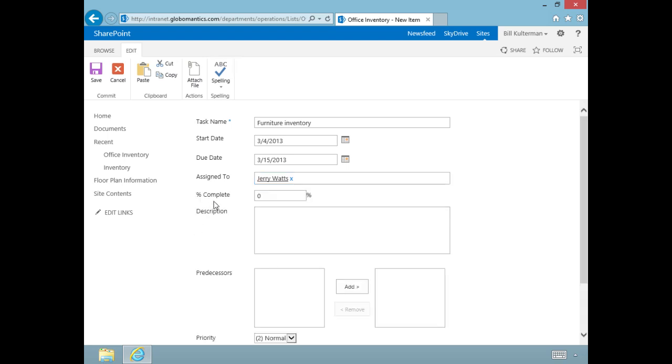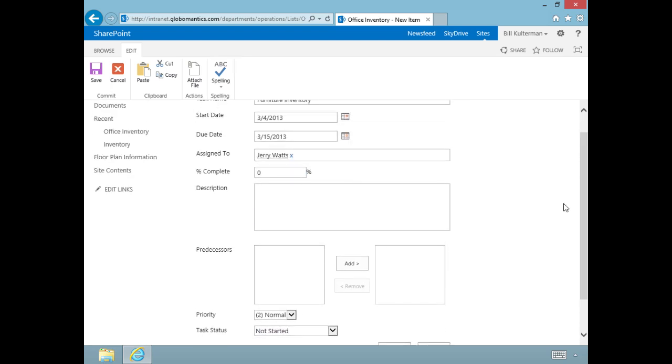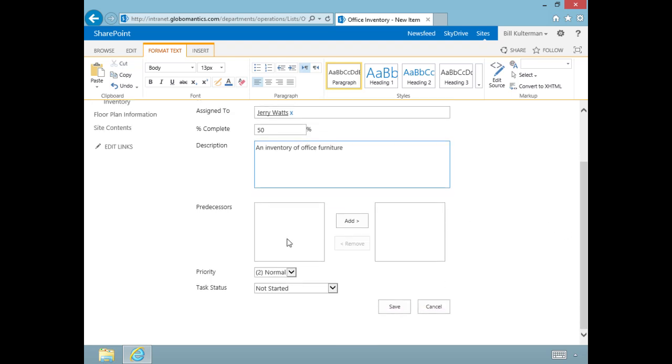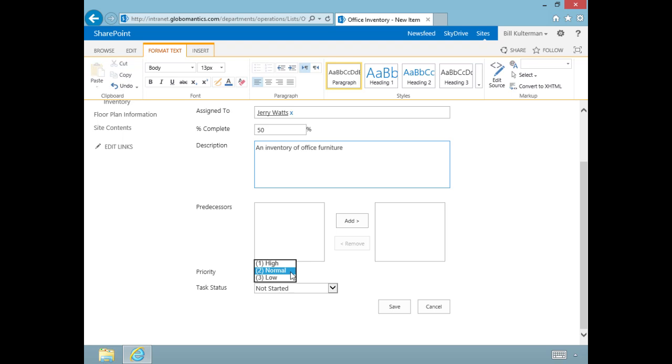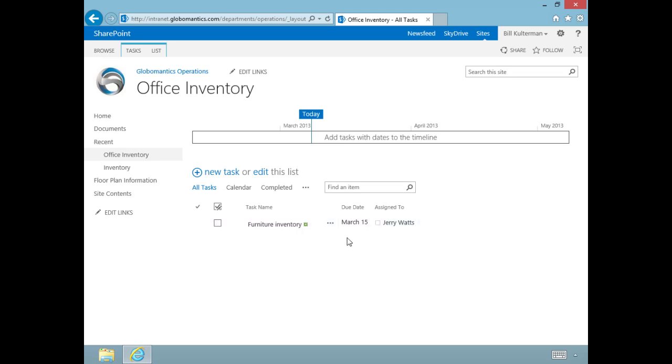We have a section that says show more. Let's click that and we have more options. I happen to know Jerry is already 50% completed with the task, so we'll mark that down. We can add a description and predecessors—tasks that have to happen before this one can take place. This one doesn't have any predecessors. We can give it a priority—high, low, or normal—and the task status is in progress. Let's click save, and there is our first task, Furniture Inventory.